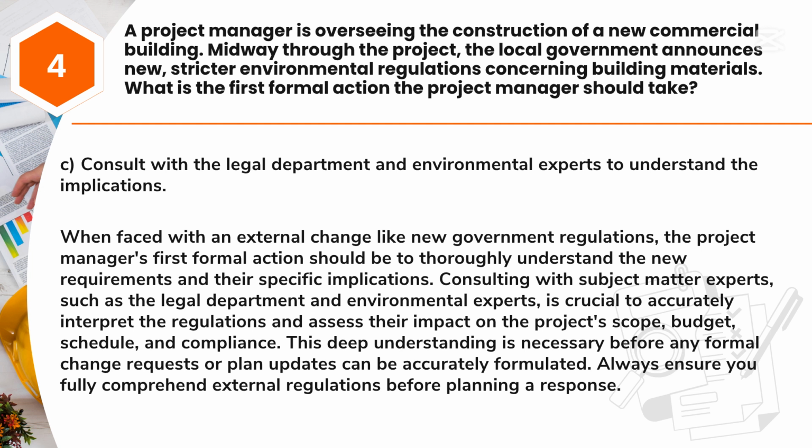Consulting with subject matter experts, such as the legal department and environmental experts, is crucial to accurately interpret the regulations and assess their impact on the project's scope, budget, schedule, and compliance. This deep understanding is necessary before any formal change requests or plan updates can be accurately formulated. Always ensure you fully comprehend external regulations before planning a response.